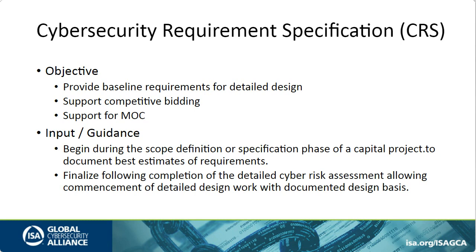The guidance is to begin documenting that as part of the scope definition or specification phase of a capital project, and then finalize it after you've completed your detailed cybersecurity risk assessment. And as I said, it provides that foundation for detailed design with a documented design basis.